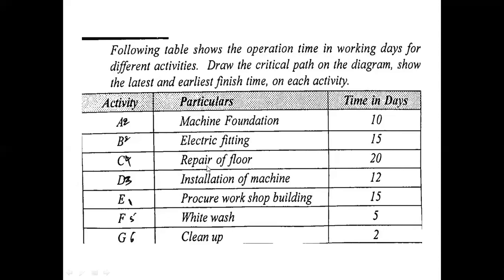And then the floor can be repaired, and after repairing of floor, what is the final thing? We are going to do the whitewash. If you do the whitewash before, what happens? While repairing the floor, we are going to have some dust. So that is one more problem for whitewash. So after repairing the floor, we have to do the whitewash, and after whitewash, we have to do the process of cleaning up of everything. So this is the last phase. This is the last activity of this network.